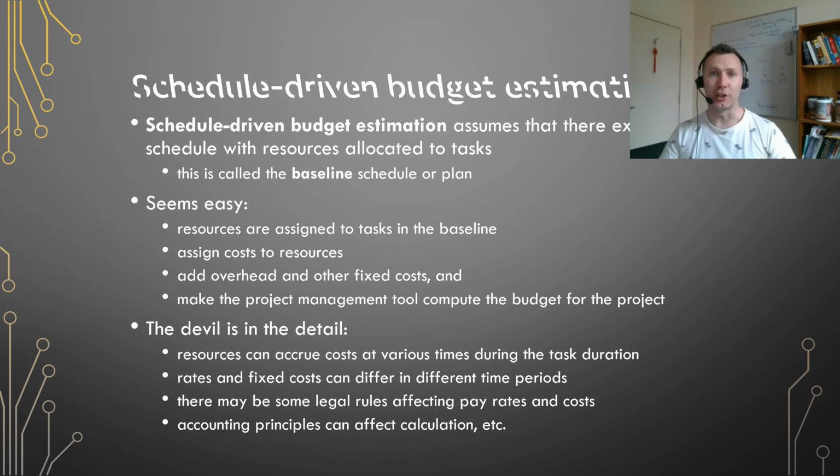Schedule-driven budget estimation is a bottom-up method of estimation. The idea here is that we have already developed a schedule and we know what resources we have available to complete each task, and we call that the baseline. It's something that software management tools can do really easily. And on the surface, it all seems very easy. You work out what resources will be needed for each task, and then what each resource costs, and the fixed costs, press the button, and it's all done. However, there's more to it than that.